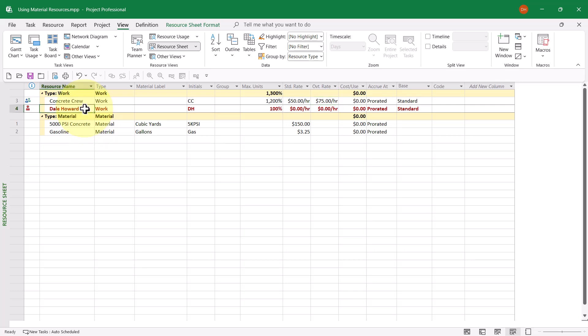Notice I have a second resource named Dale Howard. His name is formatted in red because he's currently assigned to a task where he's required to work seven days a week, which means that he is over-allocated as far as Microsoft Project is concerned. However, that's not a problem. He can work seven days a week on the task. When you see the task, I think you'll agree with me.